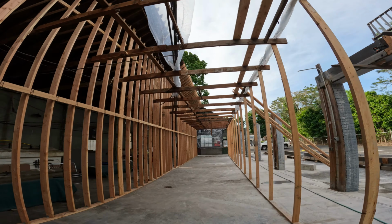So that sucks. Then I talked to my metal guy and he tells me that every year, the week before Memorial Day, he's not available, so he can't start building these posts until next week. Meanwhile, we're gonna be at a stopping point. We're gonna have probably a week of no work getting done here because we can't do anything until those posts are fabricated, and then we still have to drill the holes in the beams and prime everything. So I'm a little frustrated about that as well. I mean, we got a good amount done today, but it's just frustrating.